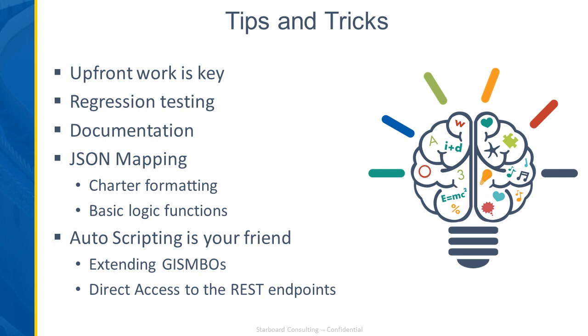So if you go about configuring something and then have to redo that work, there's additional time to remove everything, and there's different places where some of that data will be embedded, and so there's a learning process that goes along with that as well. So it's really important that you identify the feature classes that you want to have in the relationship between Maximo and your EAM or your GIS system. It's also important you identify the fields and how those fields will be mapped between both systems up front as much as possible before you start your development effort.